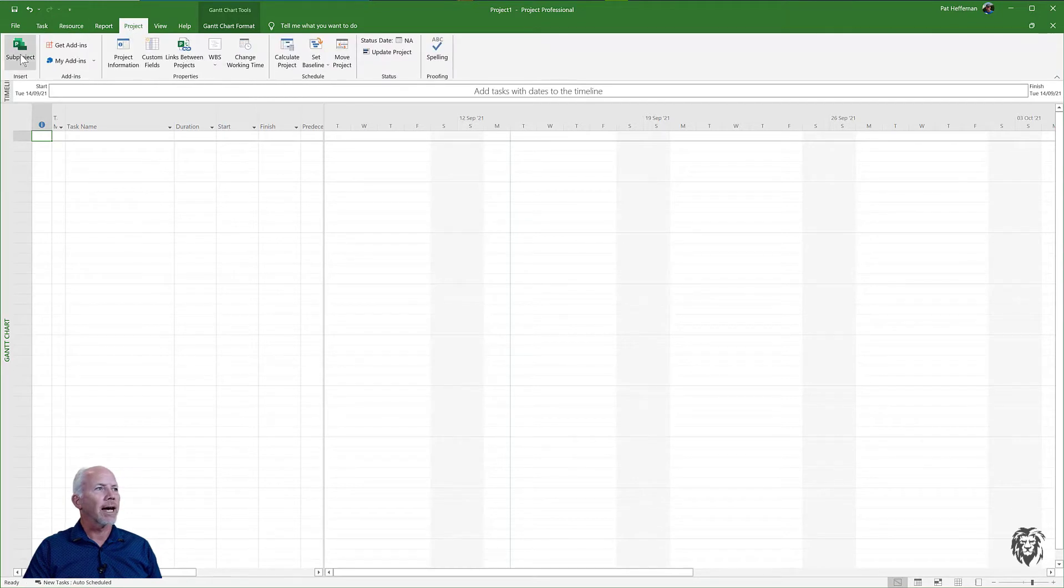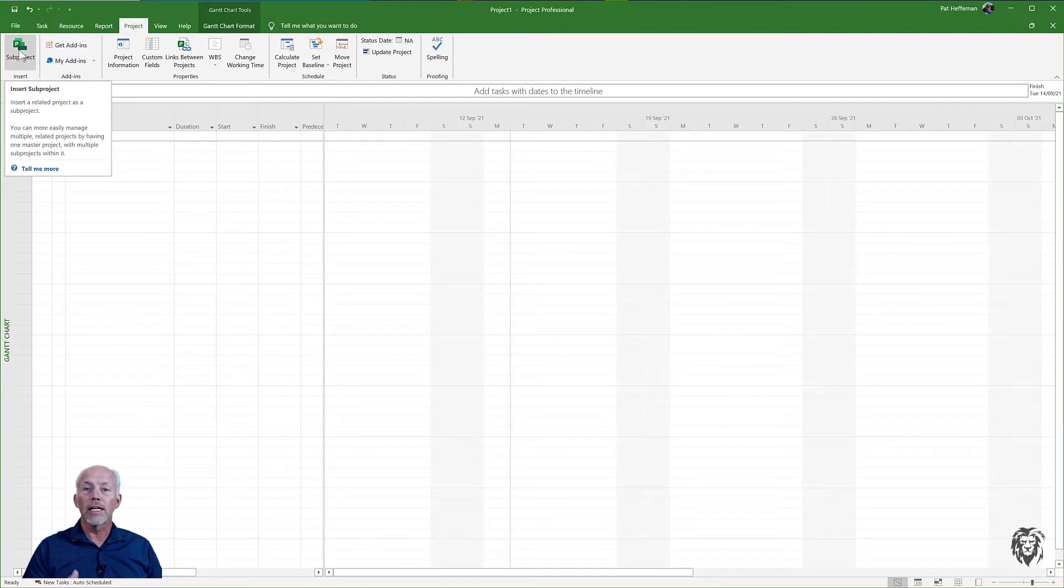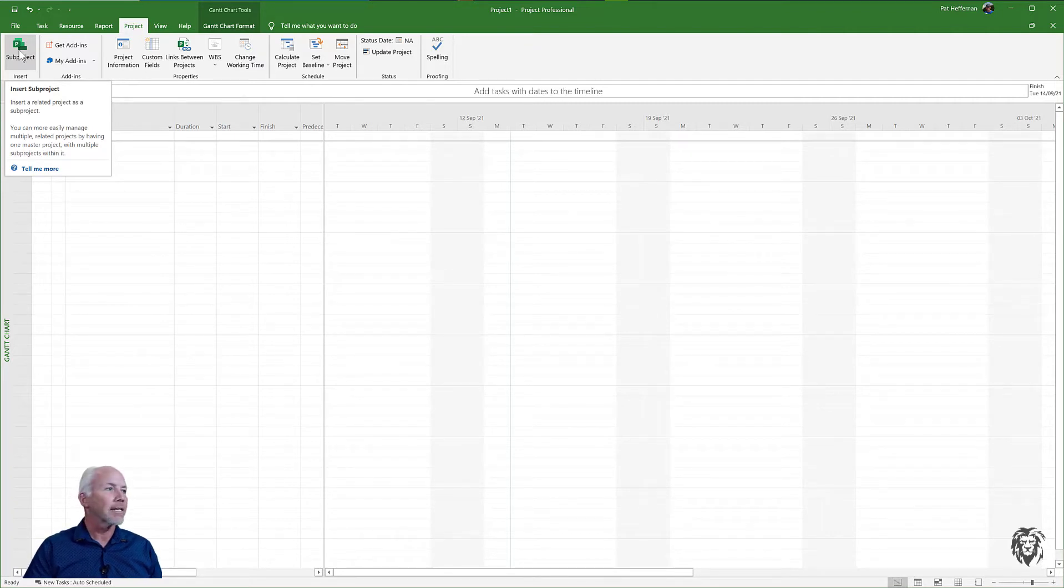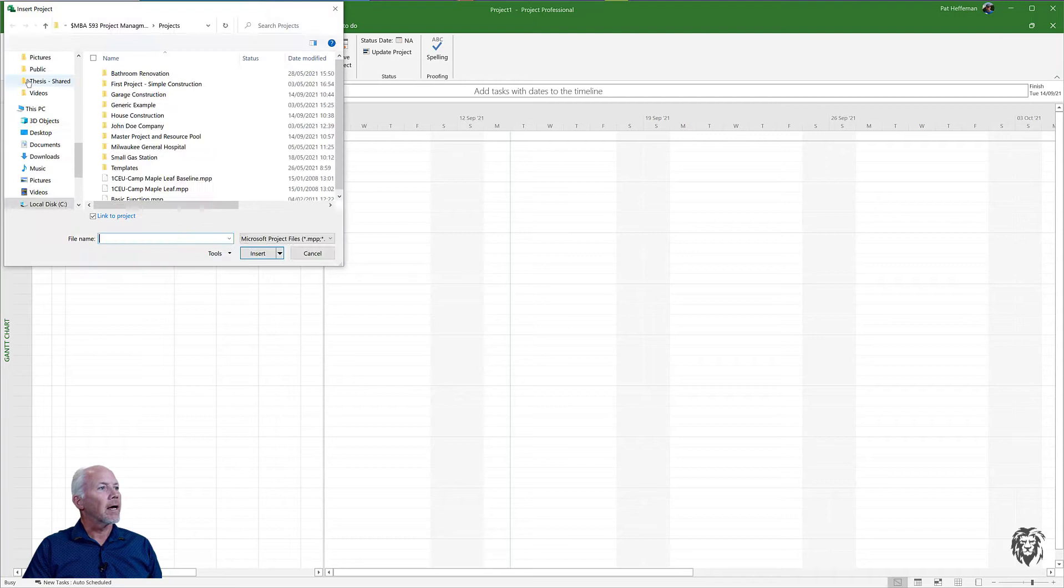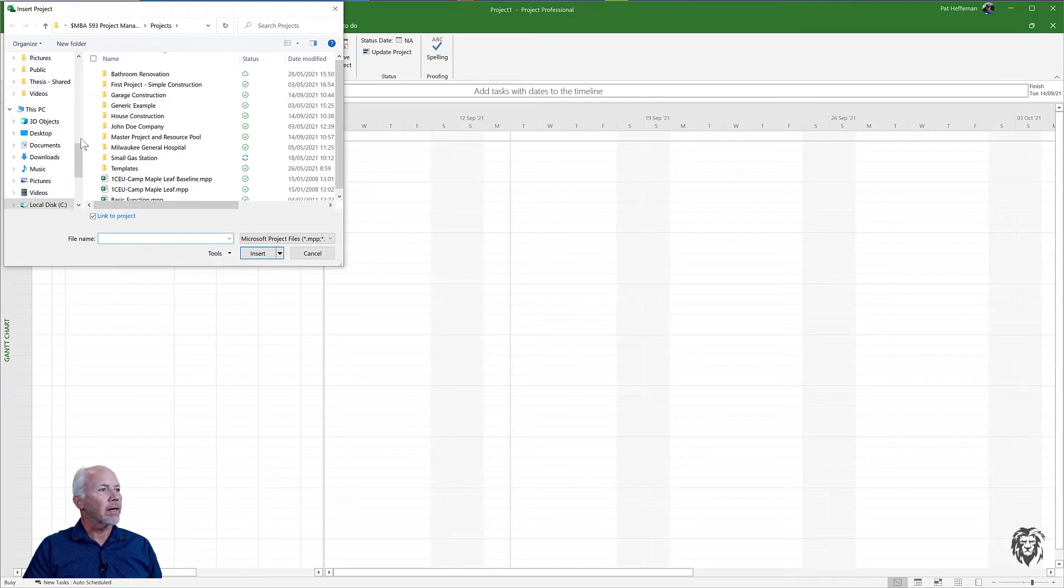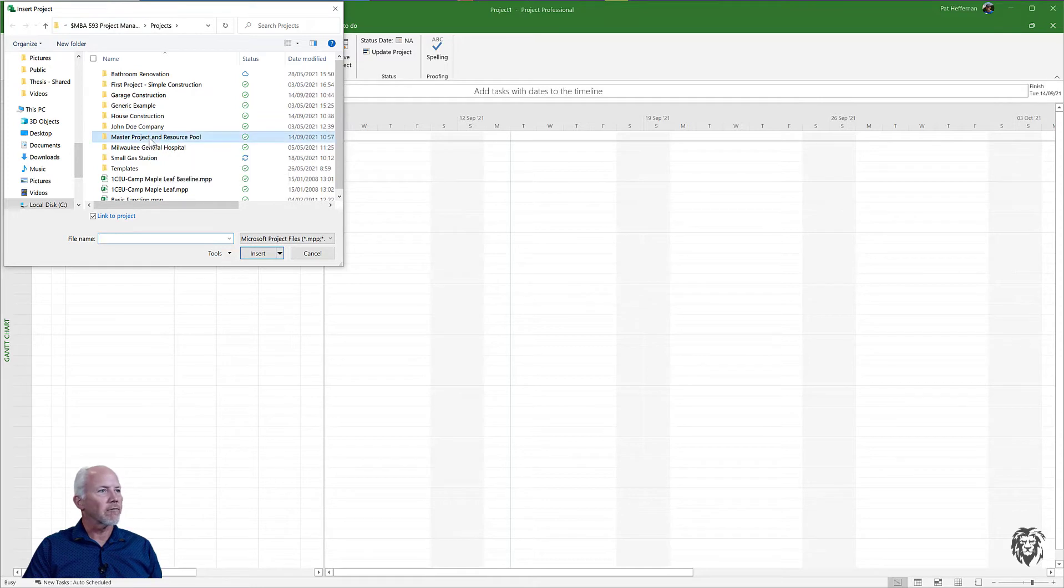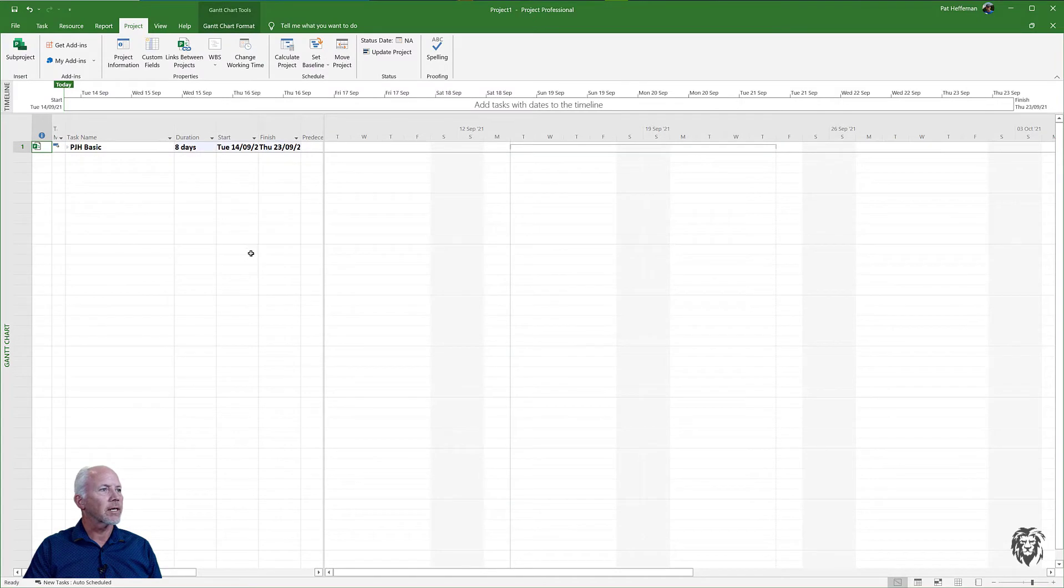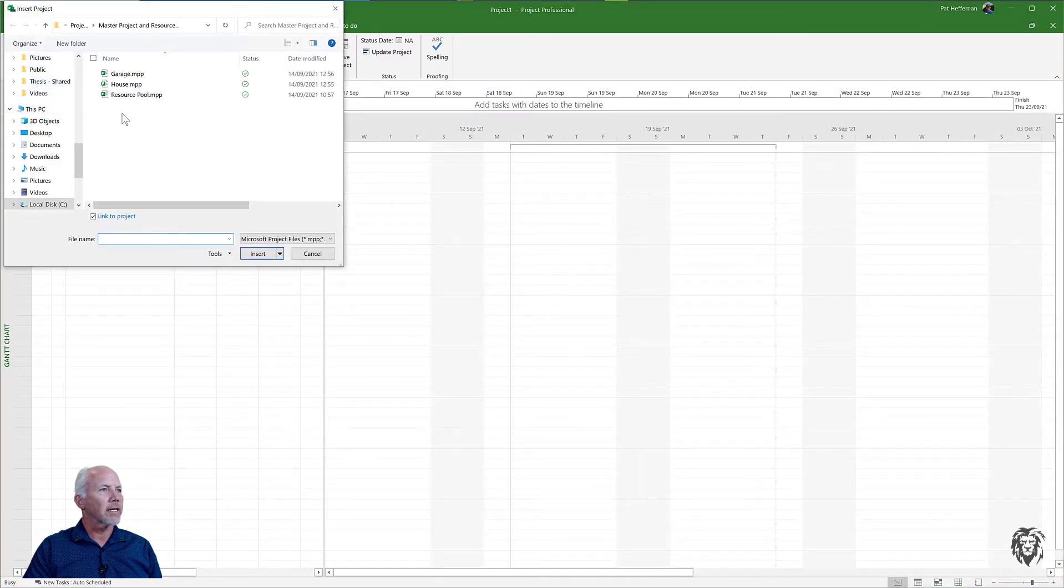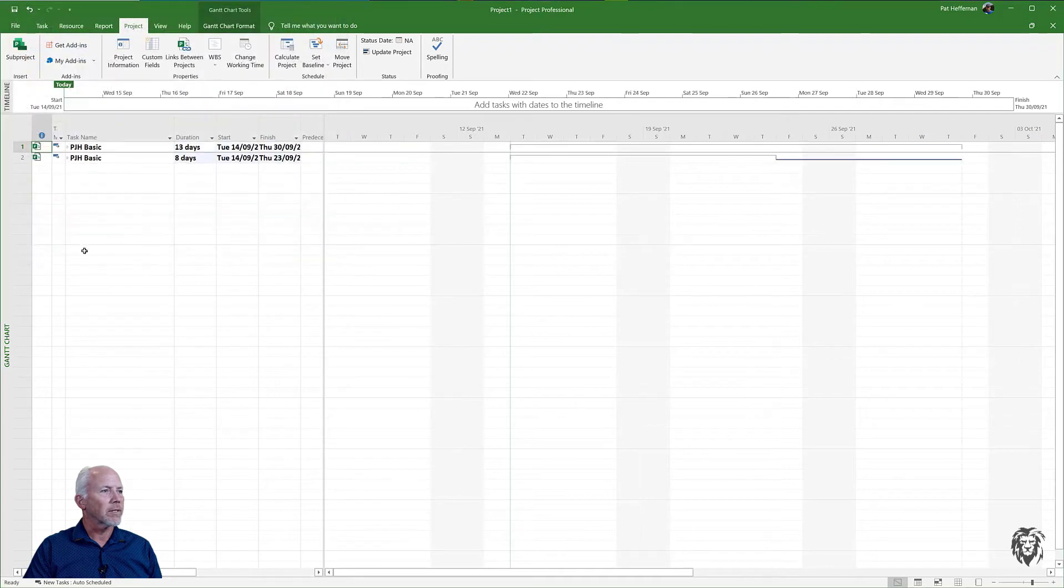Now I have my new project file open. If I go over to the Project tab, I have this sub-project button and I'm going to insert my other projects as sub-projects. I'm going to choose my garage project and insert it, and then I'm going to insert the house project as another sub-project.